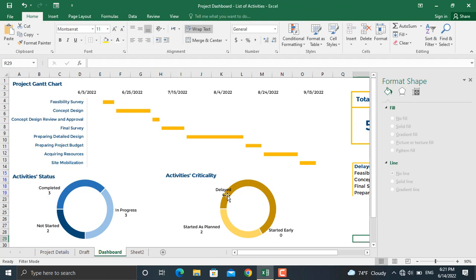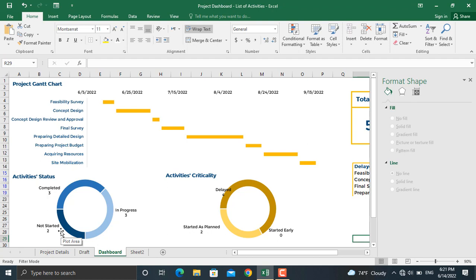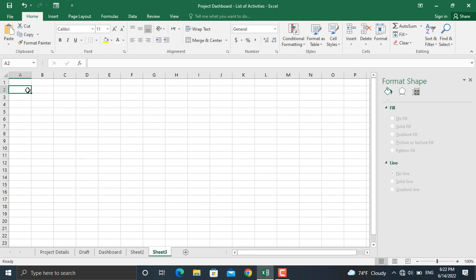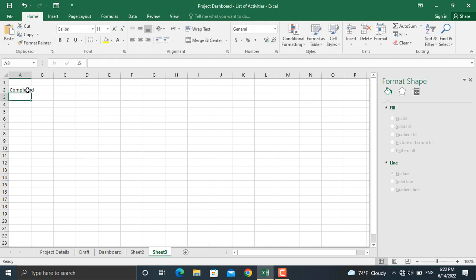In the donut chart area, the activity status shows the number of completed activities, in-progress activities, and activities not started yet. In order to calculate their numbers, I'll create a new sheet and write down: number of completed activities, in progress, and not started.